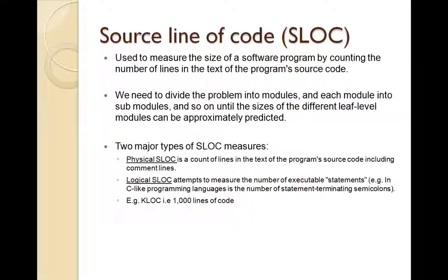We might have some algorithms written, or flowcharts written, or a control flow of the project derived. Based on that, we try to understand how many lines of code are going to be involved. We can also use historical data and industry data. If you are writing an assembly language program, then for a single for loop statement, how many lines will you have to write in assembly? For the same statement, the same logic, how many lines of code will have to be written in C, C++, Java, or any of the other languages?